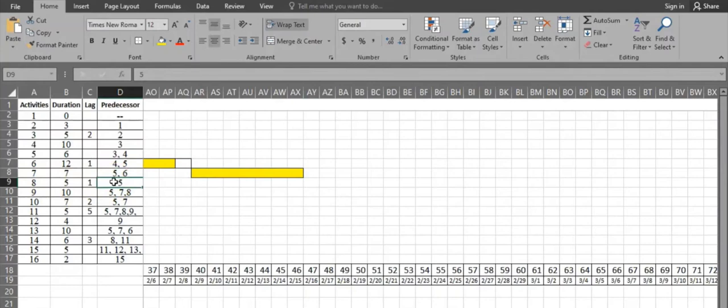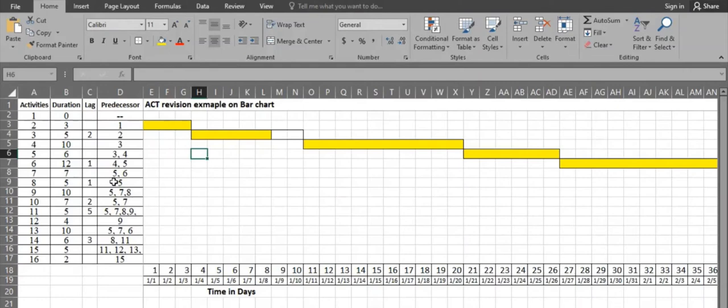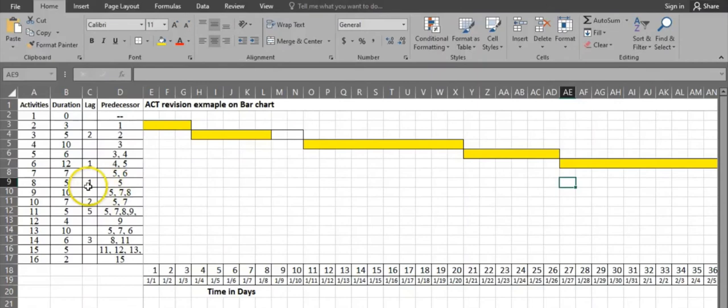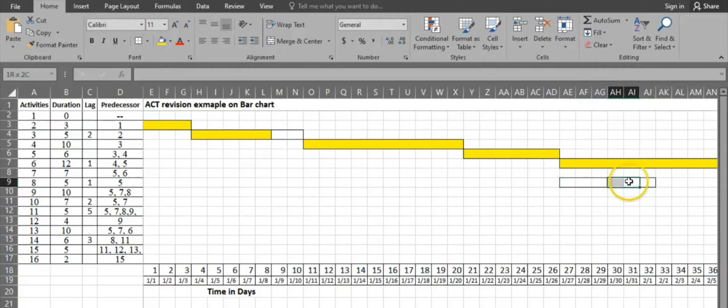Activity 8 has predecessor activity 5. Activity 5 finishes on day 26, so activity 8 starts from day 27. It has a duration of 5 days plus 1 day lag. Marking the lag: duration is 5 days — 1, 2, 3, 4, 5 — so it starts on day 27 and finishes on day 31.